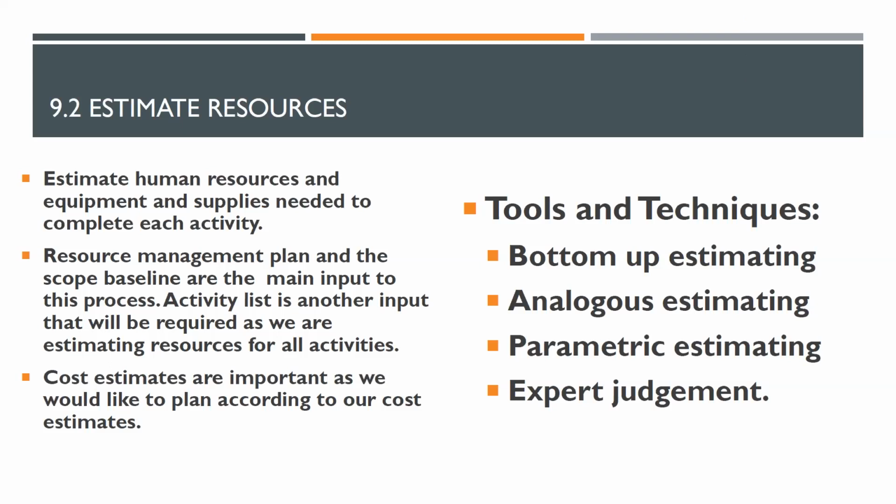What is parametric? I think, I'm not really sure about this. If it takes 10 hours to cut down 10 trees, then it would be logical to say it will take 6 hours to cut down 6 trees. Yes, you're right. So parametric, you're using calculation or estimating, you're measuring something, you're doing some estimating with calculation using statistics. So that is parametric.